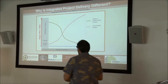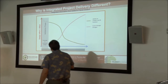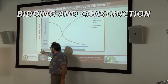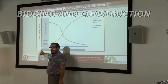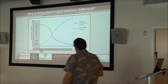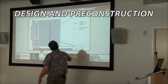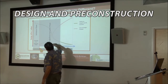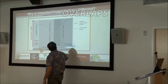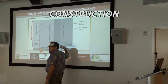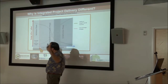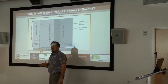Now, typically in our standard this would be pre-design schematics, but the cool part is we're starting bidding and construction right here, day one. So that's where we sign our contract — this is where we all commit to it. Now, the design and pre-construction phase overlaps with our construction phase. What? I'm an architect — I want to finish everything up front. No. We want to deliver the information just in time.